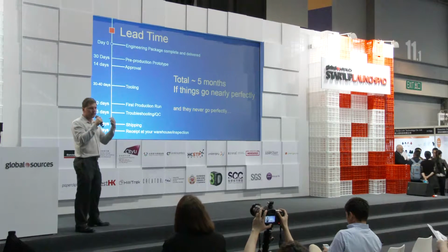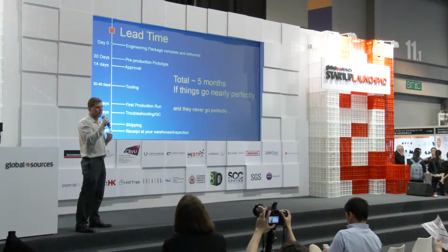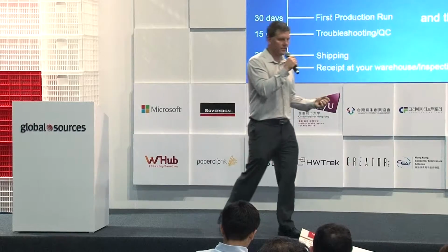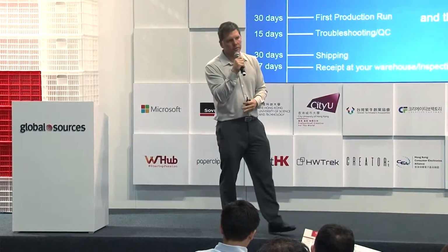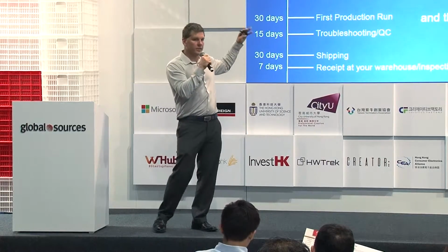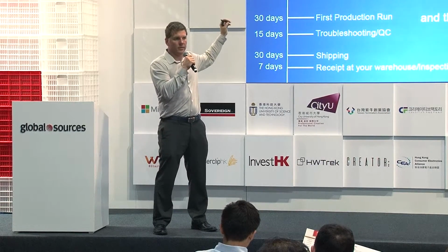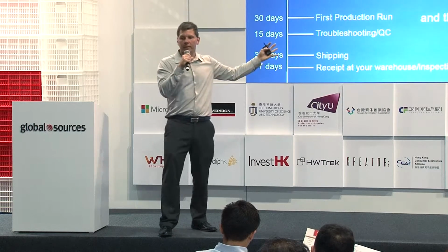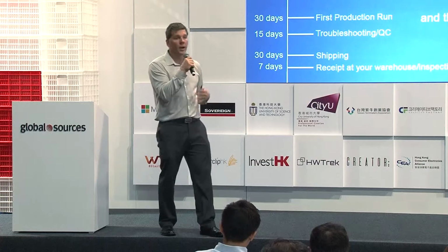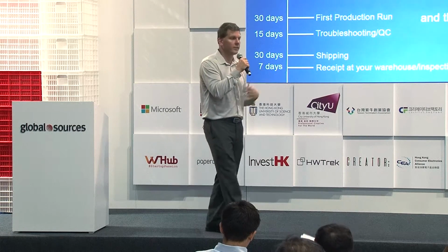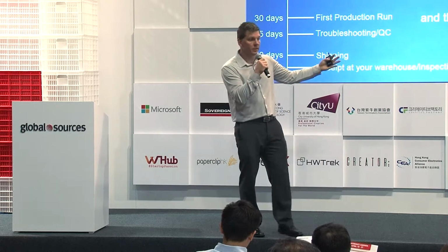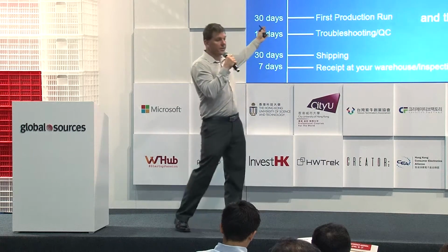In my experience, it's not usually the manufacturer that delays things so much. I mean, there's good and bad partners, certainly, but where that really becomes apparent is if the engineering package is not well done, that a bad factory will really struggle with that, and they'll come back and say, oh, all these things weren't defined, so that's going to cost you twice as much, or that always adds into the price. So that adds to this time quite a bit, right?